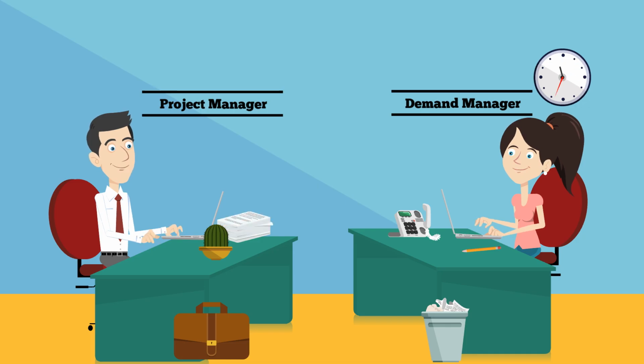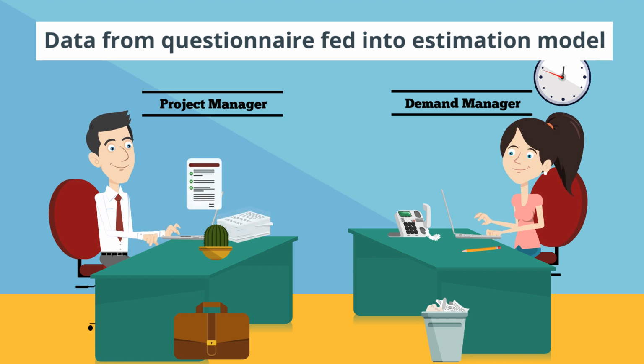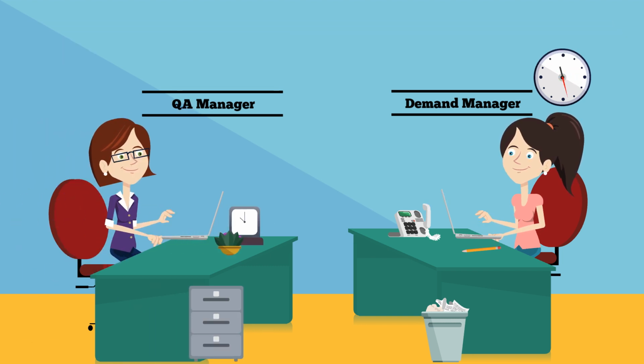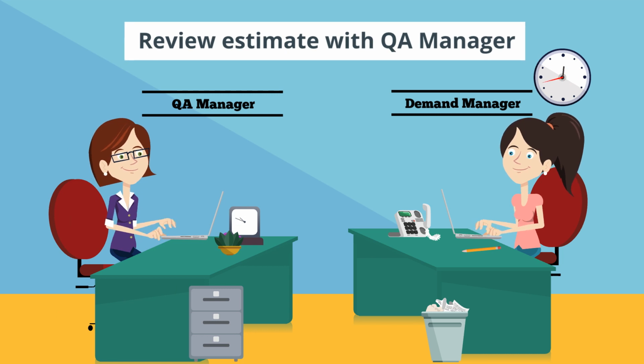Once the project manager responds to the questionnaire, the demand manager feeds the data into the estimation model, which derives the TCO estimate for the project. The demand manager reviews the estimate with the TCOE QA manager, and this estimate is then sent to the project manager for approval.